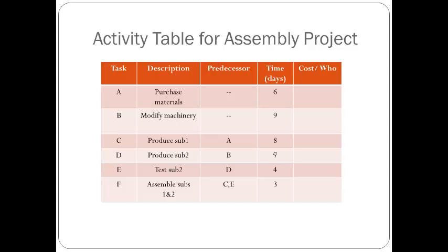And we always put the activity on it. And in this table, the time units that it takes for each activity to complete are given. So we put them behind it. And then the next one is C, and we see that C has a predecessor, which is A, so that means it's after this one. For every activity on arrow, we need 2 nodes to connect it, or actually, the events, so this one will be 1, this is node 2, node 3.